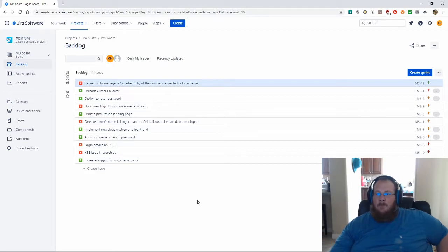You don't really want to divide them out into groups of stories and bugs, because that doesn't help people that are trying to work through the backlog of work. Instead, you tend to want to put the things with the highest priority at the top, so that as people get done with their work and the sprint or iteration isn't done, they can come to the backlog and grab the next thing off the top.